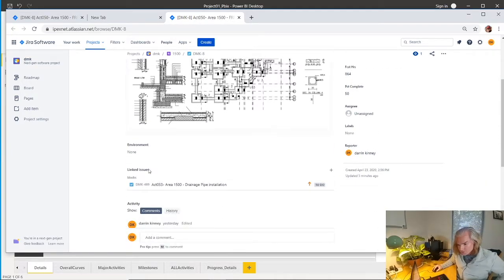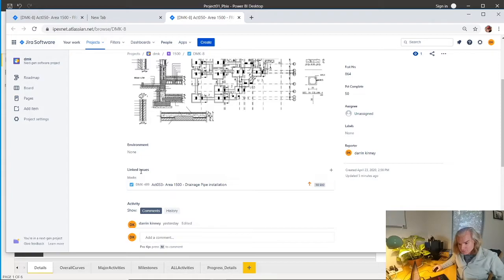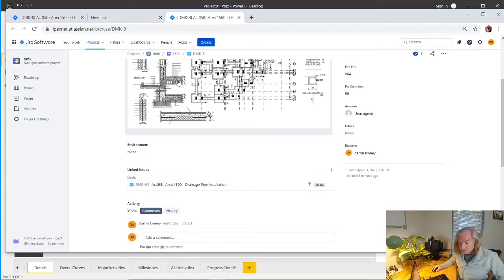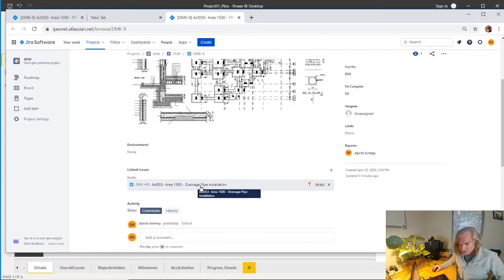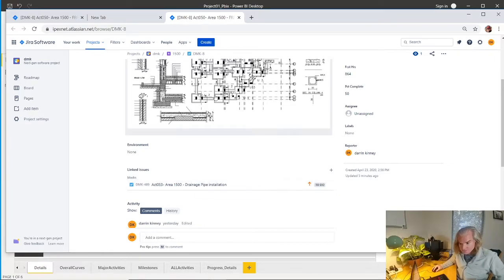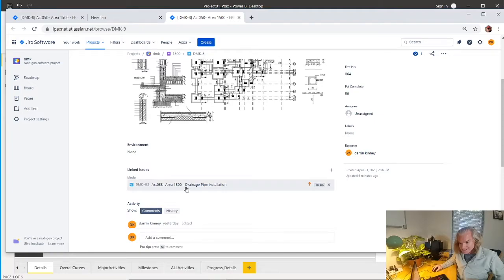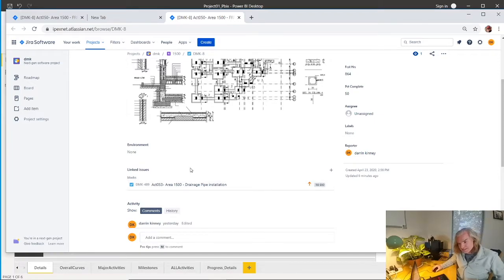You can also have linked issues. This is the same as doing a link inside Primavera. Here you're saying that before I do any of my drainage pipe, which is another activity, Activity 53, I want to finish this. So maybe that has some interface, and you can capture that as well.